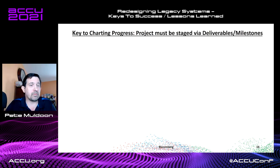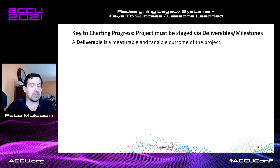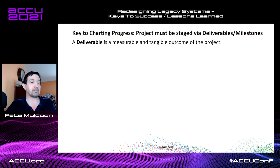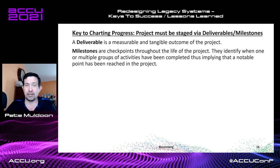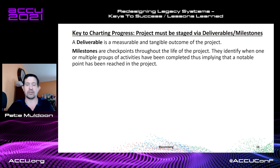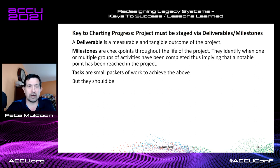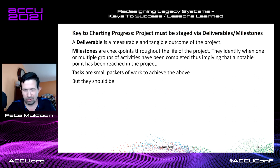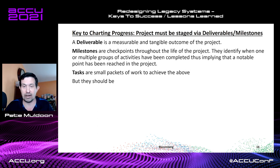The next key is charting progress. The project should be staged with deliverable milestones and tasks. A deliverable is an observable outcome of the project — I can see it, feel it, touch it. Milestones are checkpoints throughout the life of the project to say we've hit some notable point — a set of tasks or deliverables have been hit. Tasks are the small packets of work that allow you to get the deliverables done, which allow you to reach your milestones. Tasks should be short in scope, because their resolution gives you a precise view of where you are on the timeline.